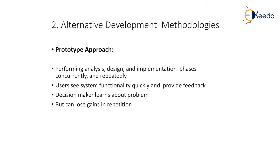The second alternative development methodology which we follow is the prototype approach. This is similar to SDLC, but for this some points of change are there — performing the analysis, design, and implementation phases concurrently and repeatedly. So in the waterfall model, we follow each step only once in the full project. But in the prototype approach, we follow that step one by one, and whenever we require, we go back and once again perform it. Users see the system functionality quickly and provide feedback. The decision maker learns about the problem but can lose or gain in reputation.